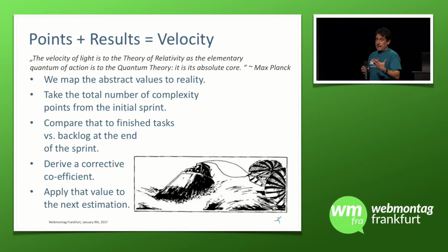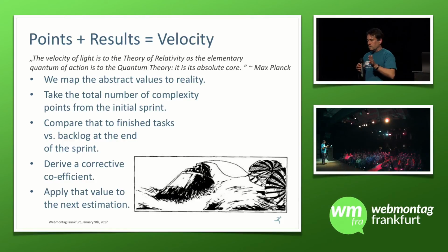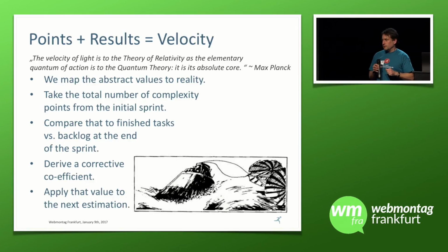And then finding out how many actual hours went into the generation, the rendering, the programming, the production of these story points, we know how much time and effort we've spent. Fine, the first sprint is going to be inaccurate, maybe even the second one, but as the project continues, we will achieve more accuracy. In classic Scrum and Agile methods, there are also mechanisms in place for dealing with complexity and uncertainty. We talked about that at the beginning of the presentation. Something new comes in, how do we factor that into the complexity?